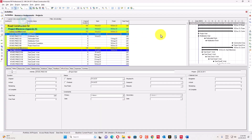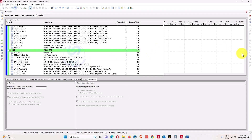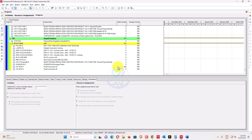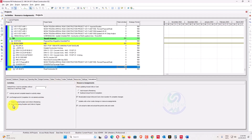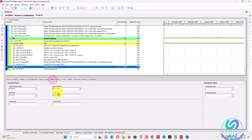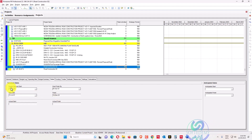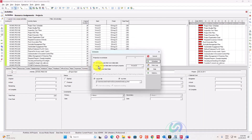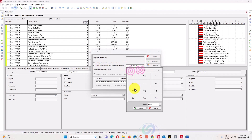In this project I have already removed the progress and set activities to not started. Before changing the data date, make sure you have selected 'Reset remaining duration and units to original' — not 'reset original duration to remaining,' which would overwrite your original duration with the remaining value, causing incorrect results. Now I'll change the data date back to 23 October 2022 to recreate the baseline schedule start point.